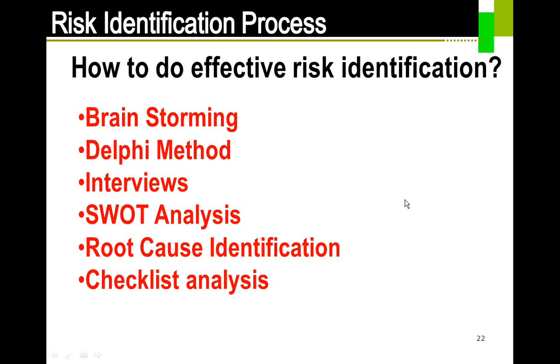And your organization never worked on MicroStrategy. The best way for you to identify the risk with the newer technology is to identify the experts who have worked on this particular technology earlier, and then say, yes, my organization is going to use this new technology. I would like to understand what risks you had undergone and how you were able to manage them. Those are all called subject matter experts.